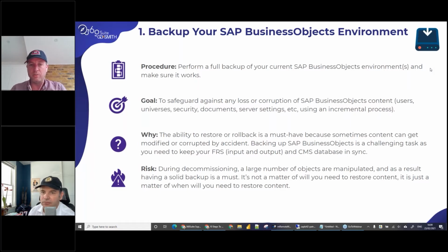Make sure you back up your security model anyway. But I've seen other companies saying, okay, we'll now switch over all of the finance reports. The finance reports have been built, they've been approved, everybody is happy. They will now remove them from the old environment because, like we've said, it's a 2 year long project, so you will do things in stages. Do keep a backup, but the kind of backup where you can restore individual reports. I know you have a backup of your system database, I know you have a backup of your file store, but somebody one day will say, where's my quarterly finance report? You can't just restore an entire platform to recover one object, right? So make sure you have good backups for obvious reasons.